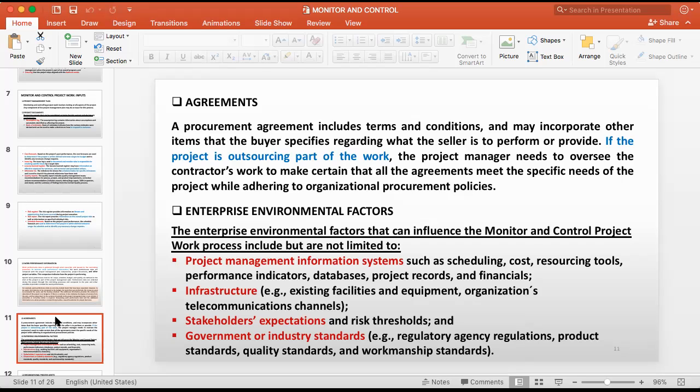If your sand supplier is not supplying your sand, there's an undersupply. So you have to make it correct. You have to find another supplier, or put that man out and get a good supplier. Those things you have to do. That you can do only if you do monitoring continuously. Then you can take the controlling action.